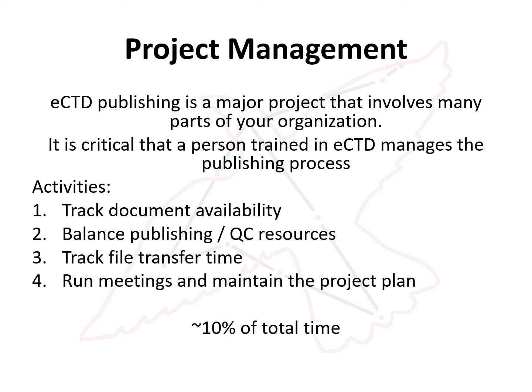Finally, there is the project management. Just like any large project, you need to have someone who is monitoring the process of the project and ensuring all the milestones and timeframes are met. This typically takes about 10% of the overall project time. The reason it is so relatively high is we also include other activities that are not strictly project management. For instance, file transfer time. Some of these applications can be 10, 20 plus gigabytes.